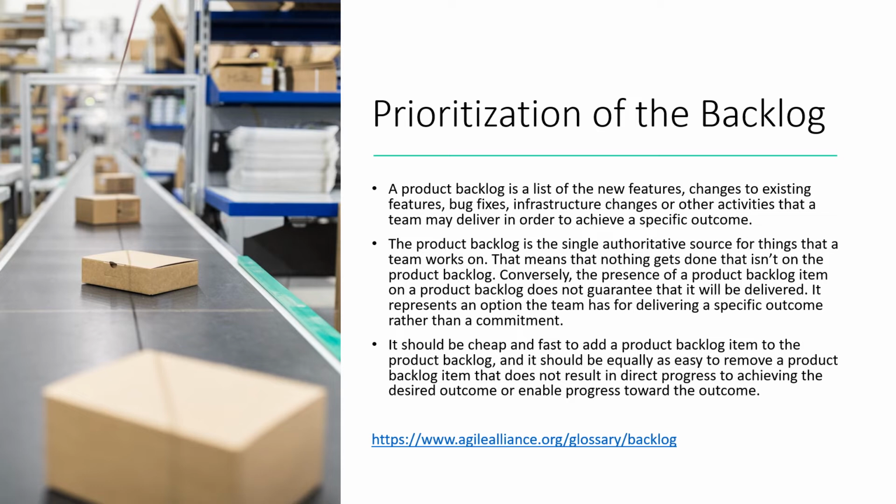There are a number of reasons why a feature or requirement is considered a high priority. For instance, requirements may be prioritized because they provide a competitive advantage or they provide a cost savings or revenue increase. And while the reasons may vary, so do the methods for prioritization. Cost-benefit analysis, value versus risk, and relative weighting are all different ways to structure the approaches to the prioritization effort.